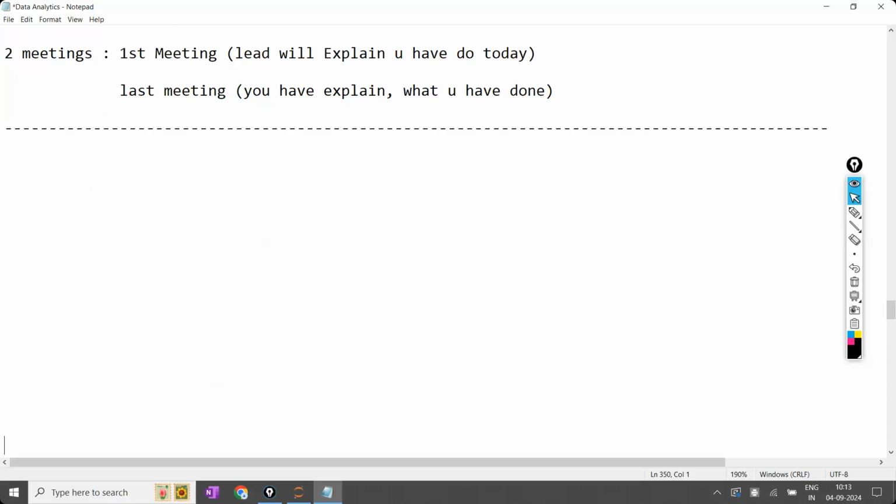Some clients will want progress every week. Some clients want 15 days progress. Some clients want 1 month progress. Some clients want it even only after the entire project. So it depends on the progress, and according to the progress levels they will release the money also. For example, we'll discuss everything in the contract, first, at the very start.